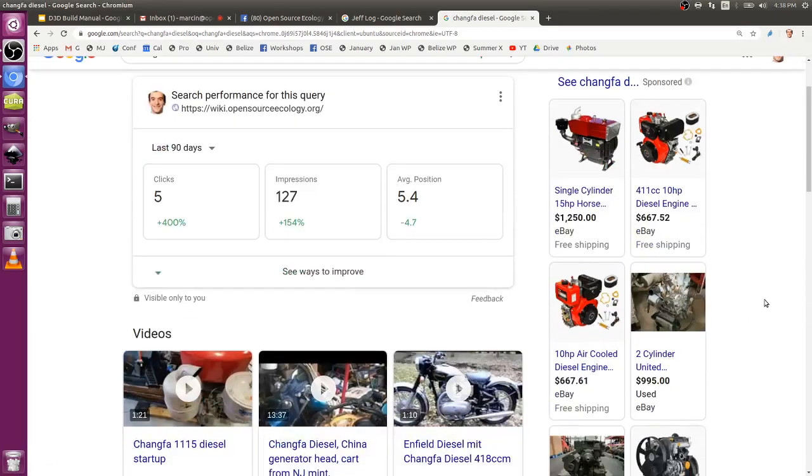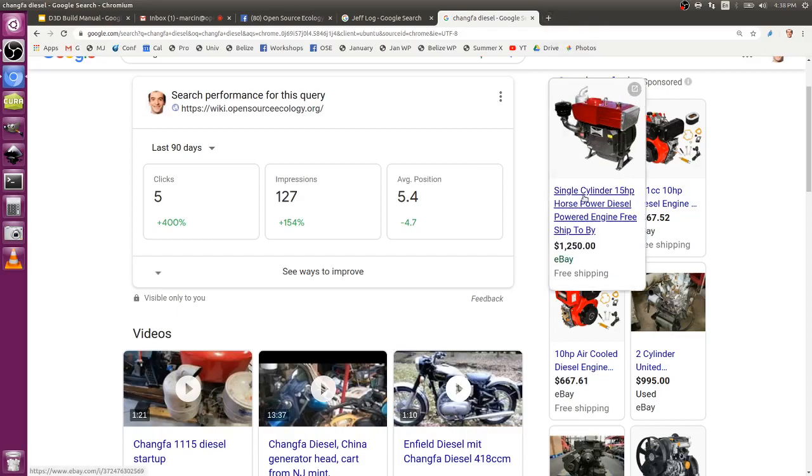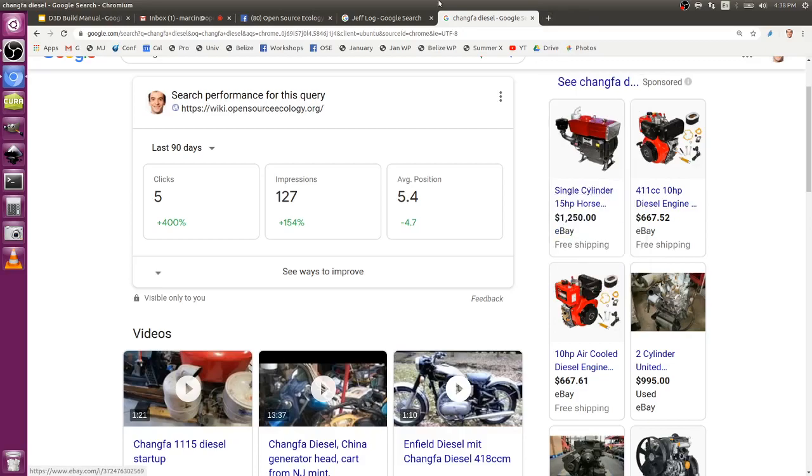We're going to get into the diesel engines July 1st. So June, we're not going to touch the diesels too much. We're doing a microfactory in the first month. The engine and life-size machines come in July 1st. So I would say we make the order probably two months before then, for the cutoff, if we want to get a few of them. I'm thinking of several, up to five or so. Possibly even more. The determinant will be how many people we have signing up.